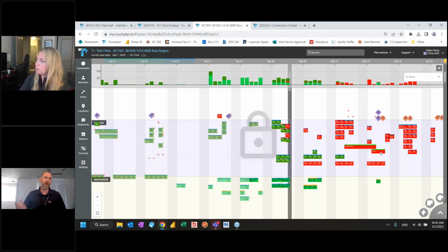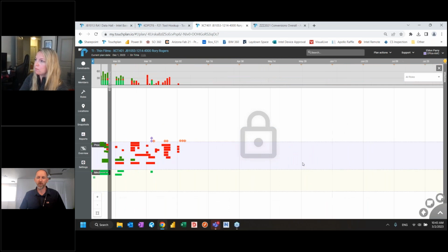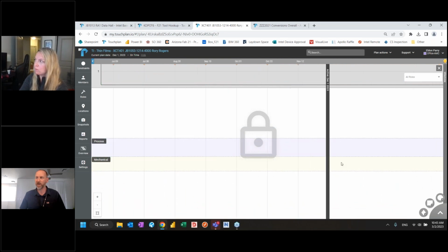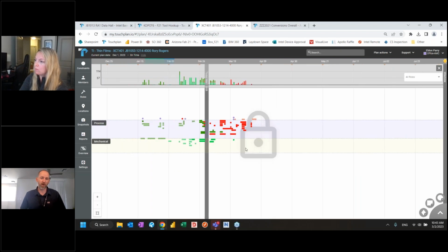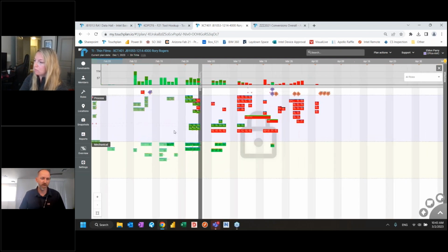If they want an oil-free air system done within the first 10 days of the project, we'll talk through, okay, well, then that means my process cooling water systems and my equipment vacuum systems are going to have to be pushed out a little bit later, because those have a little bit more of a prefabrication requirement. And we can talk through the pole plan with the general contractor. But no, we don't do your stereotypical pole plan where we put all the activities out here and then pull them over. I can't say it does, because it doesn't work. We just haven't graduated to that intelligence.